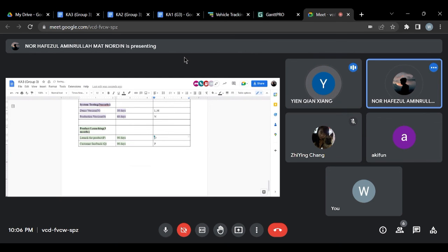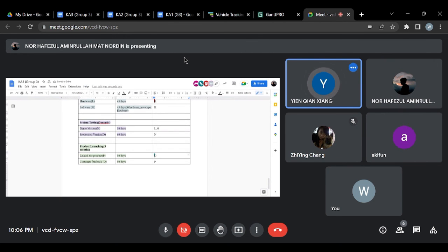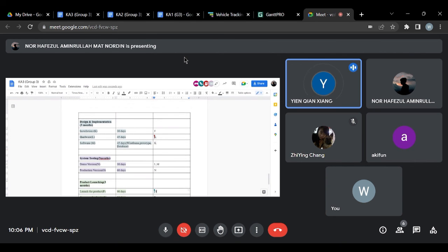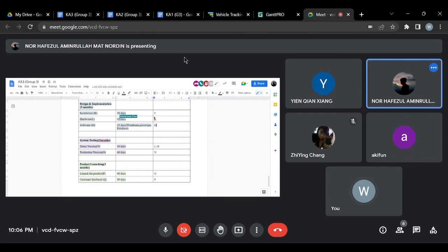And then guys, for the duration of hardware and software, I added it to become 45 days because these two can be done at the same time.